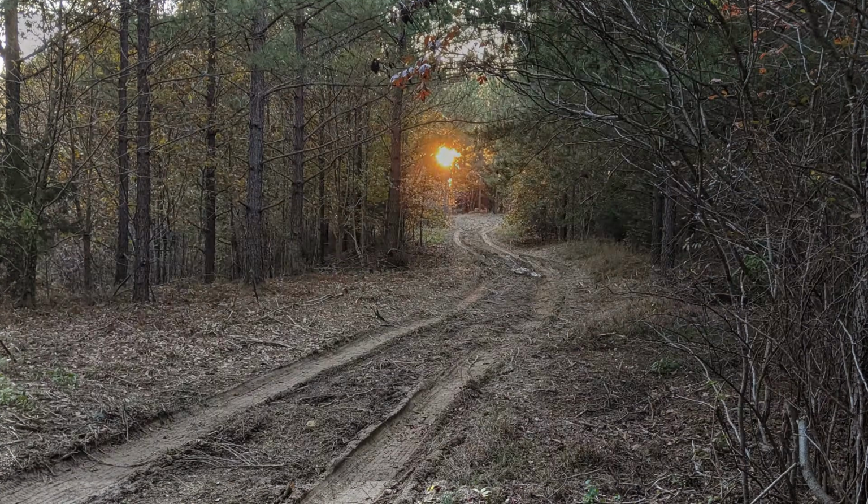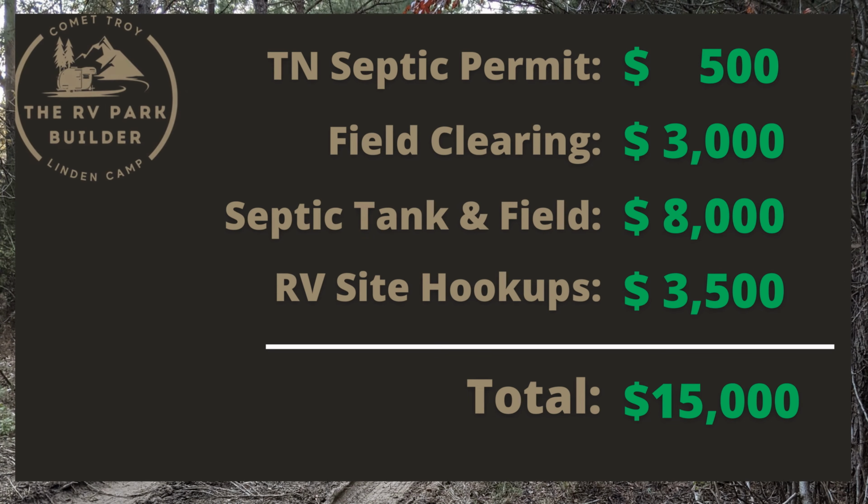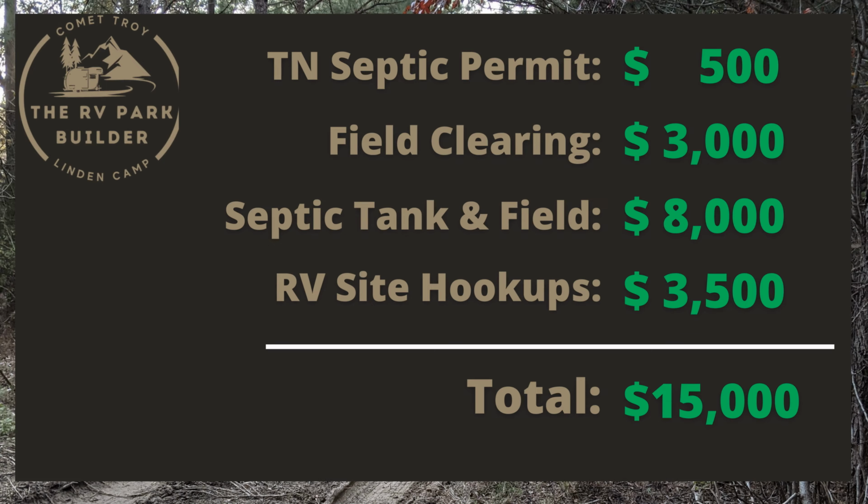There's also a $500 septic permit in the state of Tennessee that you're going to have to get, which covers the permit and the inspections. And then the septic installation itself is usually just the tank and the field lines. So you're going to have extra costs on top of that to connect your RV sites into the septic tank, which includes trenching, PVC, and the labor to put all that in. So that's an additional cost, and that's why I estimate about 15 grand for all of this, even though the septic system itself may cost 8 to 12,000.